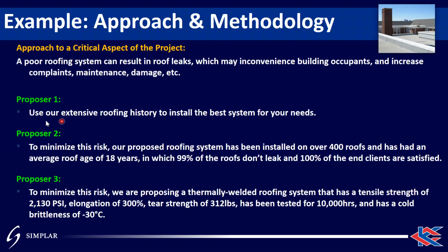So one of them said, hey, we're bringing an extensive roofing history to the project as part of our team. We'll install the best system for your needs. Don't worry about it. Proposer 2 said, hey, minimize any concerns or challenges around the roofing system. Our system that we're proposing has been installed on over 400 roofs, with an average age of 18 years. 99% of those roofs don't leak, and 100% of those clients are happy with the product.